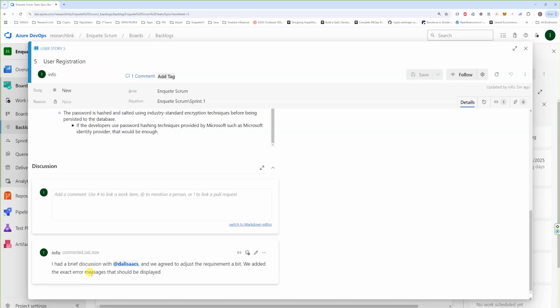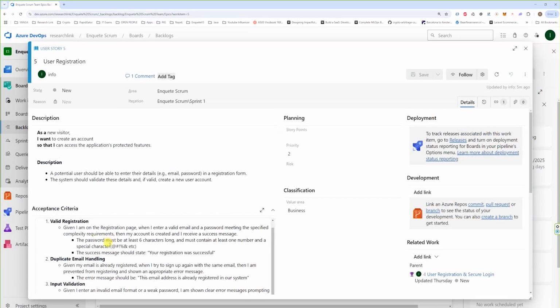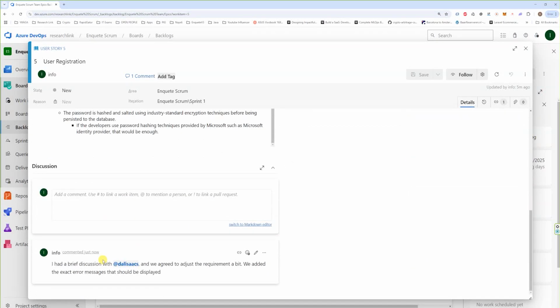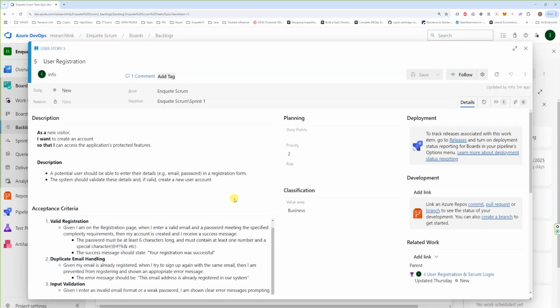And then the next step that happens is once everything is clear, that means this user story is ready to be added to a sprint. It's ready to be worked on. So what I'm going to do today now, because in view of time we're going to stop now, I'm going to assign each of these stories to one of you. So you have to create test cases for it. So we're going to work as a team now. If I has a question.